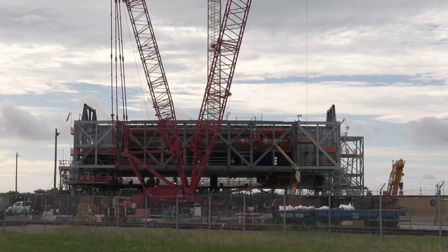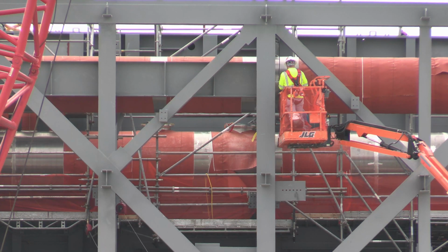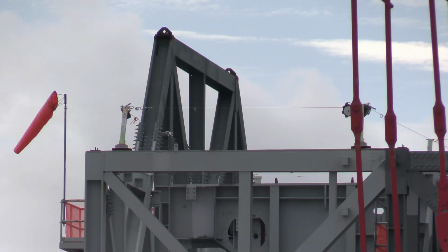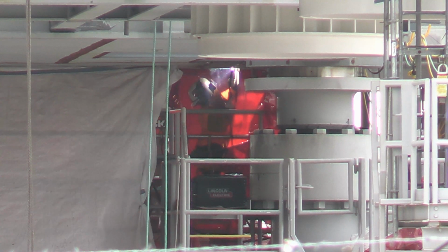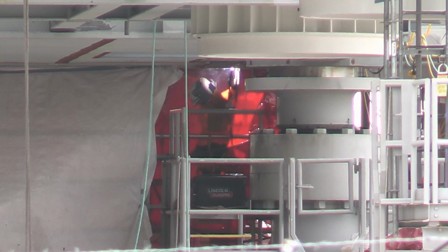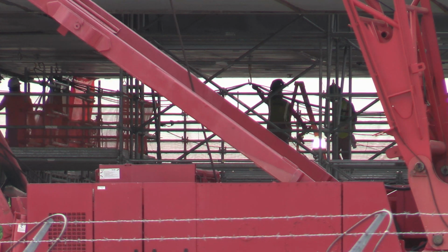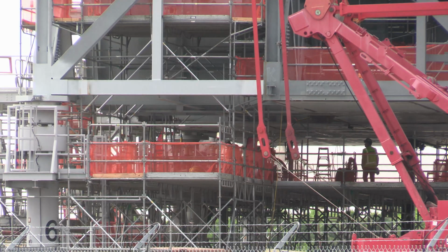An audit from NASA's Office of Inspector General found that as of August 2024, the ML2 project contract value nearly tripled from the $383 million in 2019 to $1.1 billion, with the delivery date delayed 3 years to now 2026. The OIG report also projects that the total cost could balloon to $2.7 billion and won't be ready for delivery until August of 2027. That estimate means the ML2 wouldn't be ready to support a launch until spring of 2029, well after the September 2028 goal for launching Artemis 4.